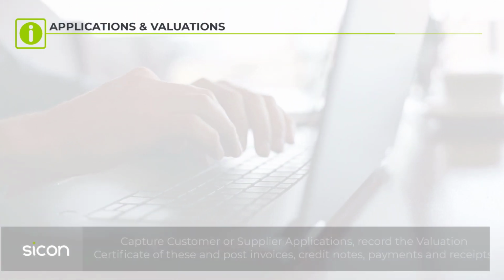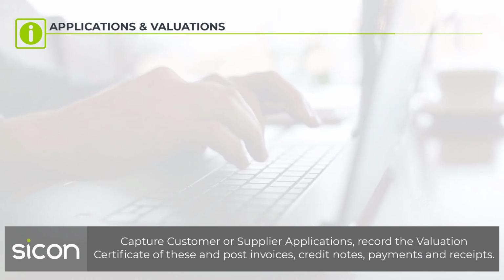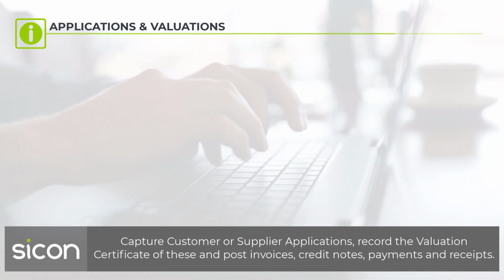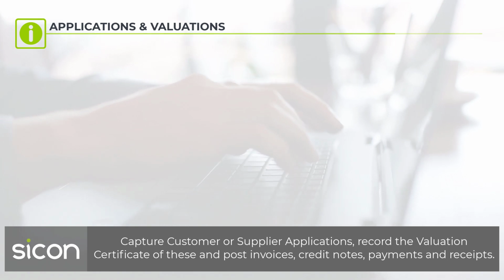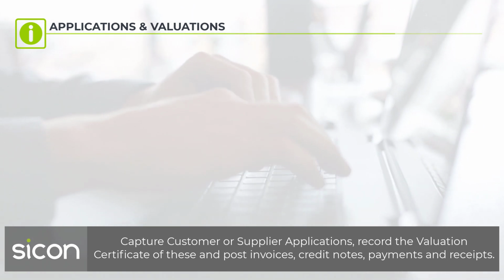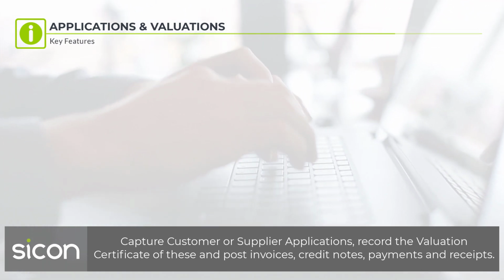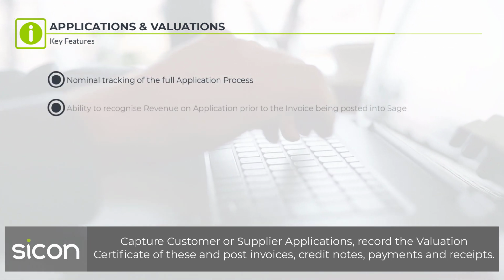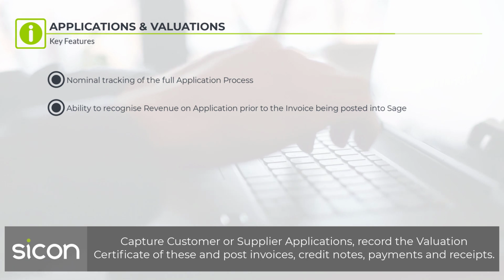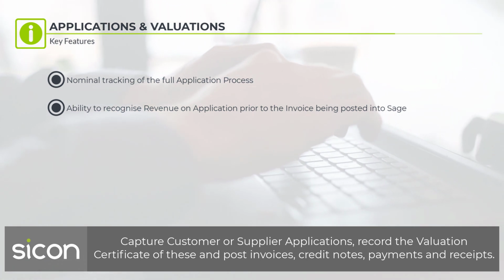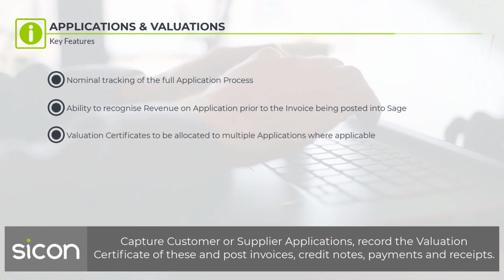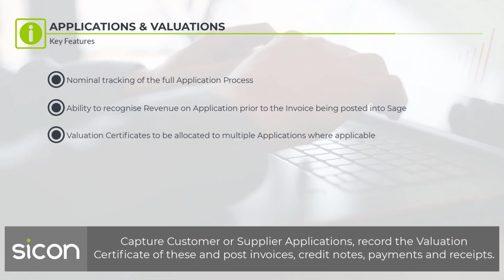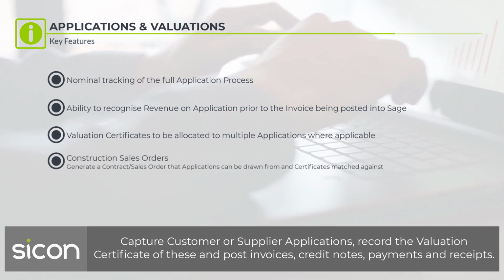Applications and valuations. Capture customer or supplier applications, record the valuation certificates of these and post invoices, credit notes, payments and receipts. Key features include nominal tracking of the full application process, ability to recognise revenue on application prior to the invoice being posted into Sage, valuation certificates to be allocated to multiple applications where applicable,